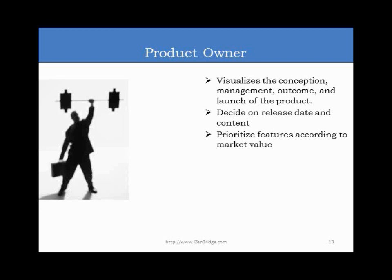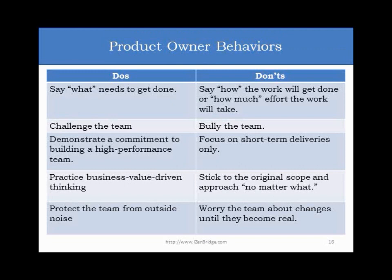The Product Owner decides the release date based on minimum marketable features. During a release planning meeting, the Product Owner brings a prioritized product backlog with an inventory of prioritized features, and the team declares their capacity. Balancing capacity and priorities occurs in the release planning meeting. The Product Owner takes the call related to priority, and the capacity is treated as fixed. Based on the team's velocity, the Product Owner decides what the release date will be, based on his conditions of satisfaction — the minimum features he wants to see in the product.